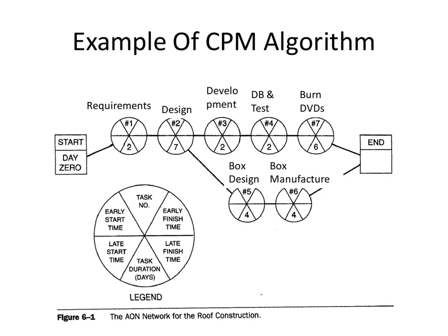19. And therefore, what's the latest start? 15. What does it mean that these two are different, 17 and 19? Yeah, you have a two-day buffer, a butter zone. Yeah, I like that. You have slack, leeway, give. You have float. You have butter zone. You have a buffer. You have a safety buffer.